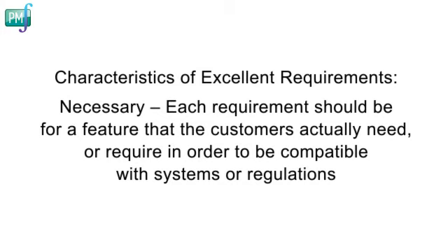Excellent requirements are also prioritized. Assign a priority to each functional requirement to indicate how essential it is to a particular product release. Prioritizing is vital because if all the requirements are classified as equally important, then it's hard for the project manager to respond to budget cuts, schedule overruns, new requirements added during the development, or other factors that require updates to the development plan.